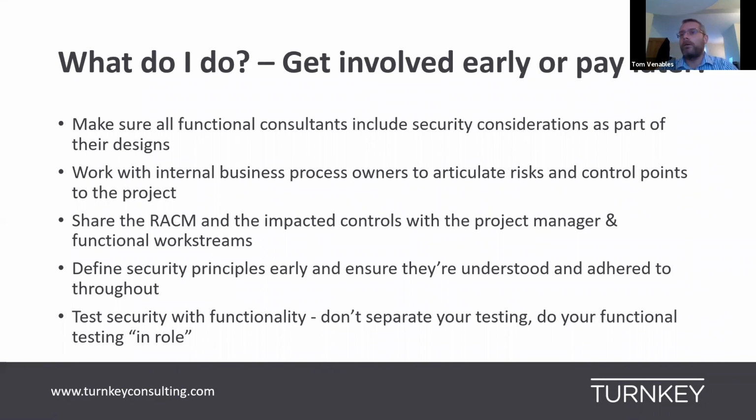Security isn't just one person's responsibility. Everybody has to get involved. And test your security with your functionality. So when you're doing your functional testing, do it in role. There isn't really such a thing as a security test script in isolation. What you have is a load of functional test scripts that should work in a secure environment. And as long as you link them together, you don't have to repeat test cycles. So you're actually saving effort and time if you go about that.